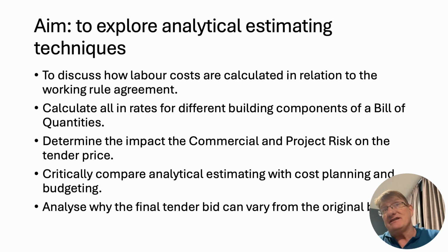Do you need, for instance, to move materials? Do I need a forklift truck? Do I need a dumper? What size dumper do I need? What size forklift truck do I need? All of these things, if you need them, then you might need to add them to your unit rate. And different contractors will approach this in different ways. Some may well just rely on pure labour rather than plant. Maybe they do a cost exercise, and it's cheaper to move using a wheelbarrow and a couple of labourers rather than a dumper or a telehandler, a forklift. So you're really analysing everything.